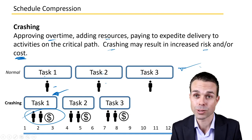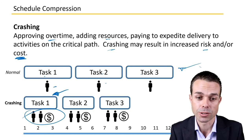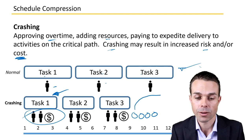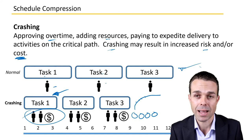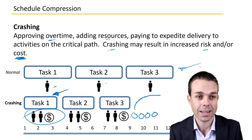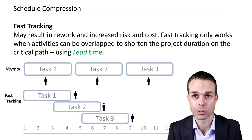You have to be aware of the law of diminishing returns, where sometimes adding more and more people means your return on that investment in people will get less and less over time. Sometimes adding more people isn't the answer. But in the case of crashing a project, we're looking for that to be the answer to reduce our project schedule.